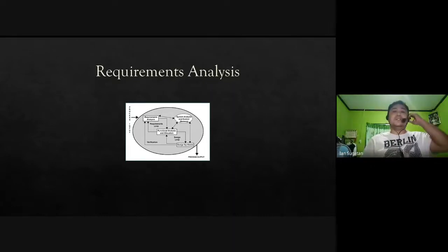The second one is recording requirements. For recording requirements, it may be documented in summary lists and may include natural language documents such as use cases. These use cases are to be learned in your systems analysis and design, user stories, process specifications, and a variety of models, including data models. For analyzing requirements, determine whether the stated requirements are clear, complete, unduplicated, concise, valid, consistent, and unambiguous.